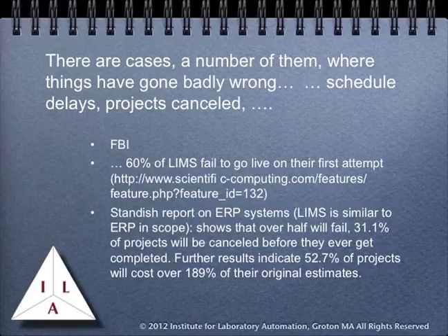A more complete report was done in 1995 and shows that enterprise resource planning systems have a high failure rate. ERP systems are similar in scope and complexity to LIMS, and as you can see from the screen, over half had to be canceled, and over 52% almost double their original cost estimate. Project management is an art, not a science. If you do searches on the internet, you'll find many other examples of cases where problems have occurred. You simply don't want to become one of them.